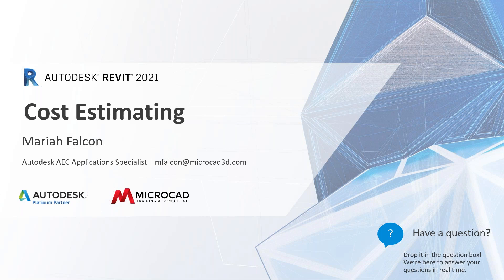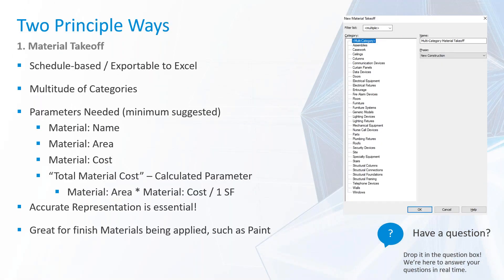We're going to speak about the two ways that you can do some takeoffs within Revit. Our first way is what we are referring to as a material takeoff. Both of these are going to be schedule-based and you can export them to Excel. There is a multitude of categories that you can work with. Some minimum suggested parameters for your schedules would be material name, material area, material cost, and then you are going to need a calculated parameter for a total material cost — that's going to equal that area times that cost, dividing by one just to ensure that our units are all correct.